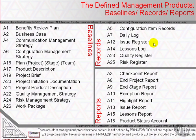So for example, the configuration item records record the status of the project's products. For example, our bakery's mixing machine may be purchased, then received, then awaiting installation.